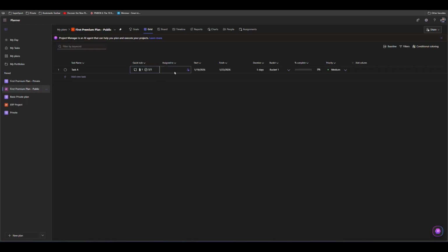Assign to is the person or persons to whom you assign this specific task. For example, I want Ellen and John to work on this, so I will have 2 of them. Start and finish are calculated by duration and also by predecessor. I will show you that in a minute.